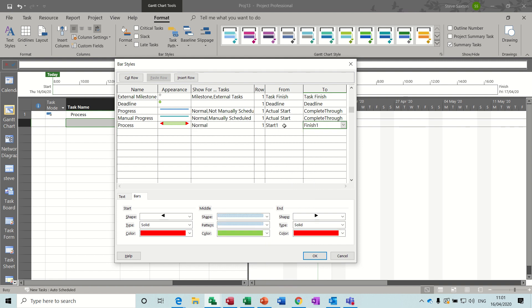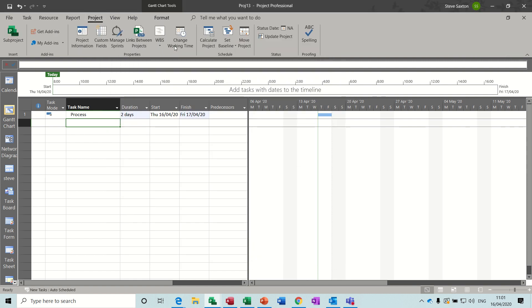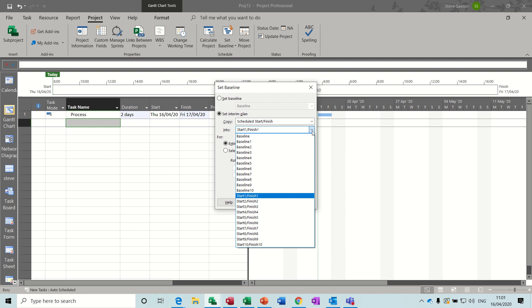You have to be careful again with this because these fields get used when you're saving, not baselines but saving interim plans. If I go to Project and set baseline, interim plans use these start and finish fields.